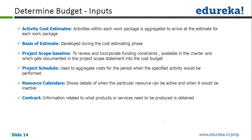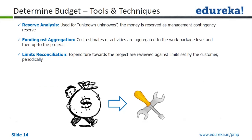Project schedule is used to aggregate costs for the period when the specific activity would be performed. Since it is a time-based budget, we need the project schedule as input. Resource calendar has availability of the resources for your project, including shift information. Contract information related to what product or service needs to be produced is obtained from the contract, along with any legal requirements or funding constraints in the contract — all of which become inputs.